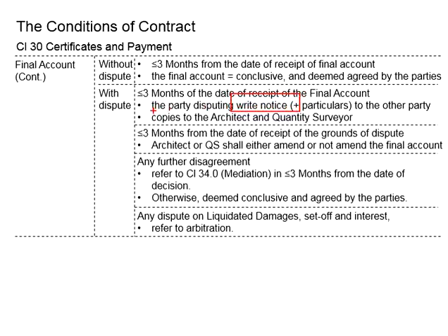This written notice will need to send a copy to the architect and quantity surveyor. This is to make known to the architect and quantity surveyor regarding the raise of the dispute, since they are the person producing the final account. So this disputing party may not necessarily be the contractor. If the employer is disagreeing with the final figure, the employer can also dispute the final account.